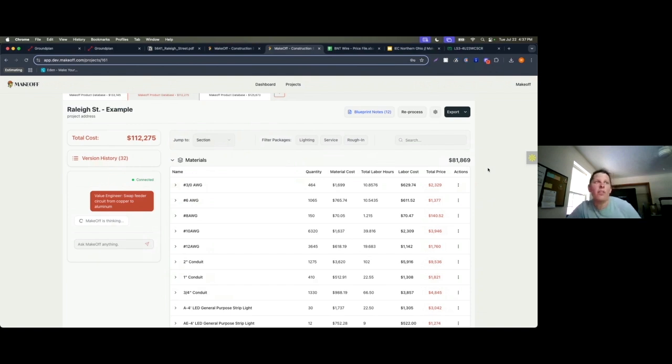When you work above the 3rd floor of a building, adding labor hours, because now you have a non-trivial time in elevators going up and down, dragging material. I know ConEst asks, how high are the ceilings, and then how high are you? Oh, I'm on the ground floor, or I'm on the 15th floor of this building.